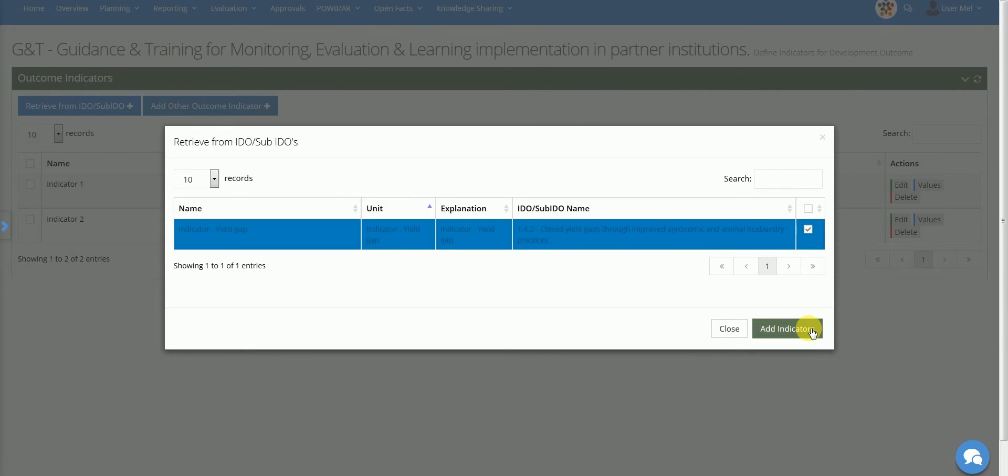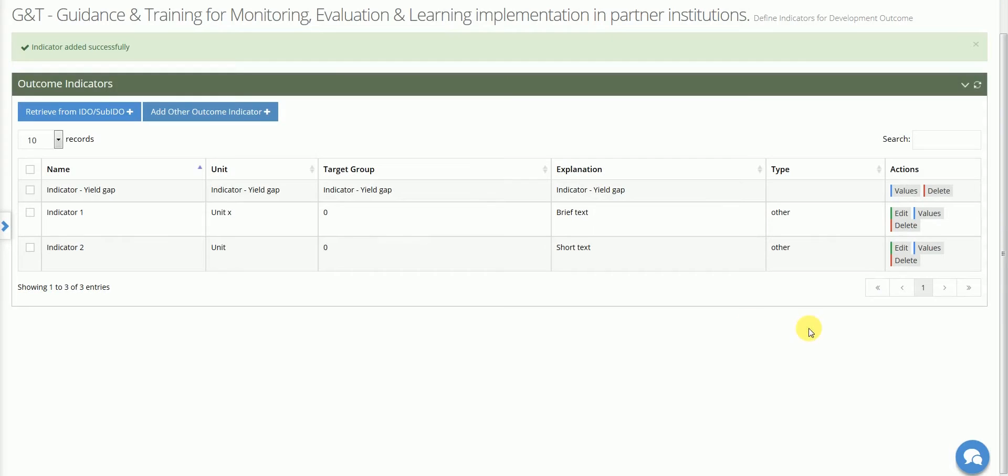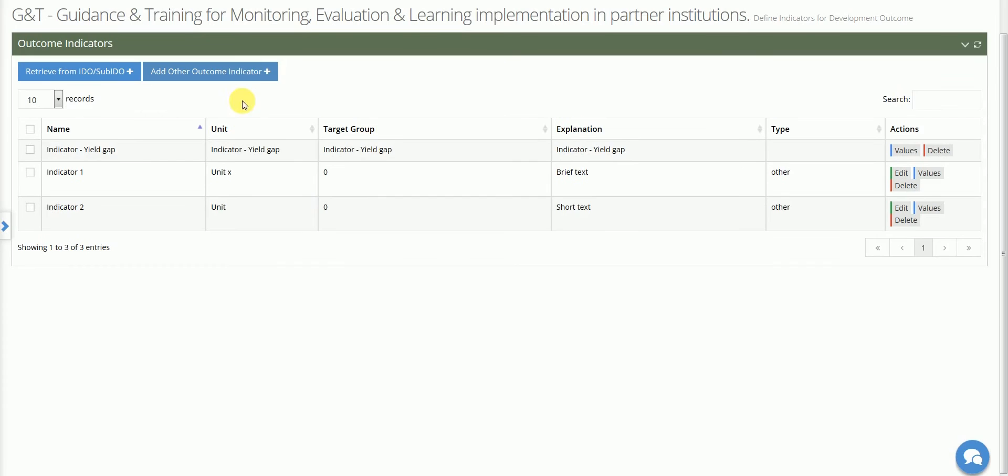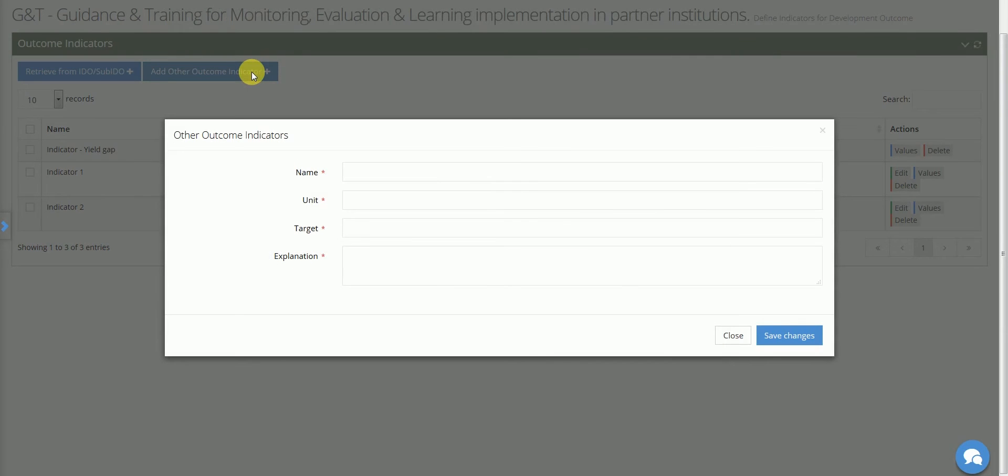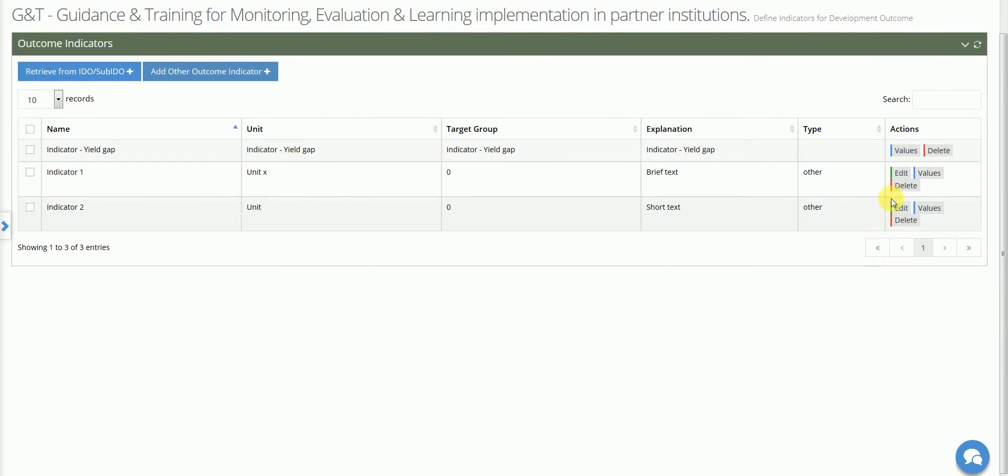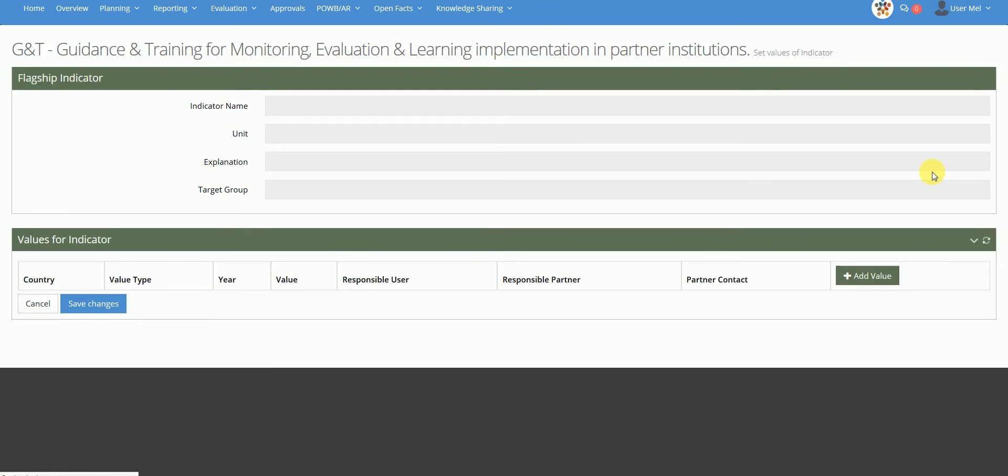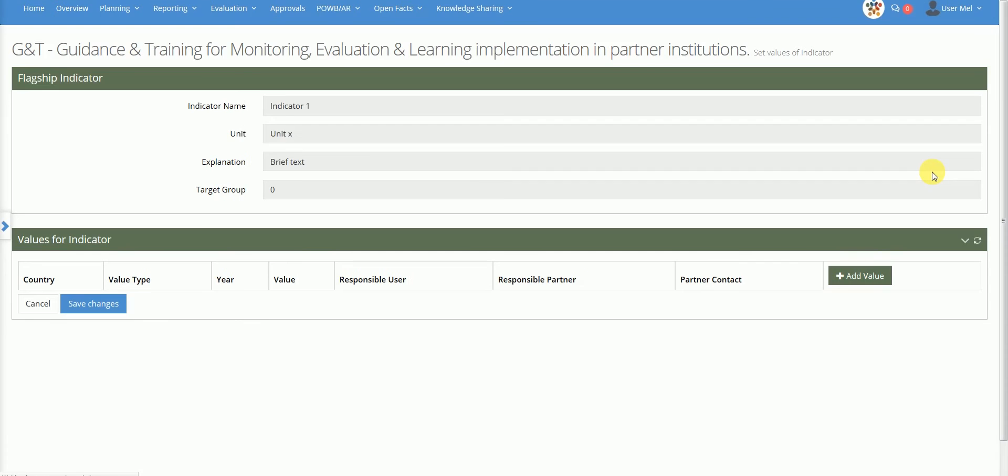To add a new indicator, select Add Other Outcome Indicators and then provide the following data: Name, Unit, Target and Explanation. When you have registered new indicators, you may also specify the baseline and the target values by country and by year and define any reporting responsibilities.